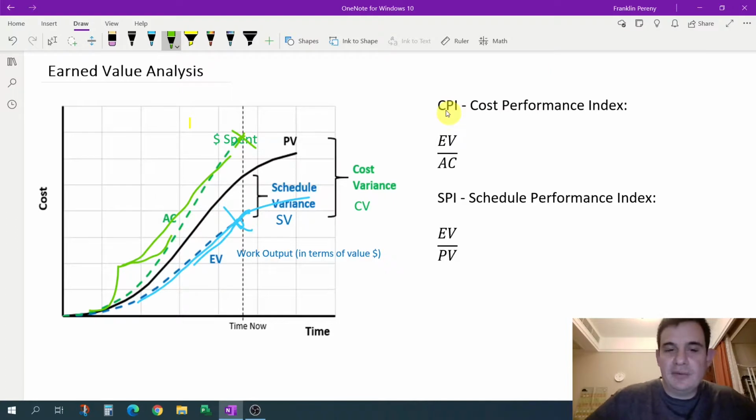I'm not going to use that on my project because that was a one-time mistake. It should never happen again. There's no reason to think that all of the activity is going to be off by this efficiency factor, this cost performance factor that we call the cost performance index. But generally, if you're halfway through a project and your cost is off by, let's say, 25%, and you don't really see that changing, that's where the estimate at completion comes in.